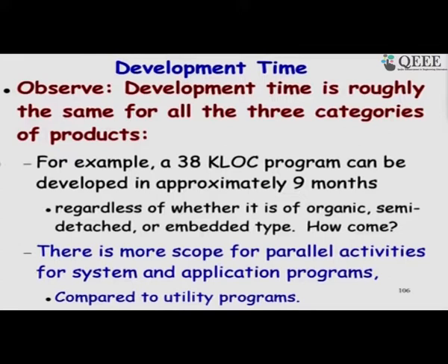It says that initially lines of code is very difficult to estimate. We should use function point during the requirement specification stage, and as we proceed the estimations will become more accurate, and after the design and code writing stage we can get more accurate estimation, and there you can use lines of code. We will look at that.